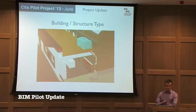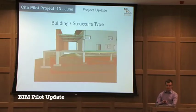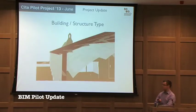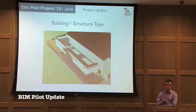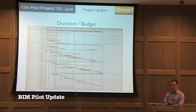We can see that there are obviously certain elements of precast to go into the building. There's first floor timber joists and roof covering, and M&E elements as well. We can see from the model that there are new internal finishes and roof coverings and cladding, etc., to be built. So all this information can be taken from the model, from the scope of works, the specifications, bill of quantities, and obviously from there you want to try and build your final construction program.